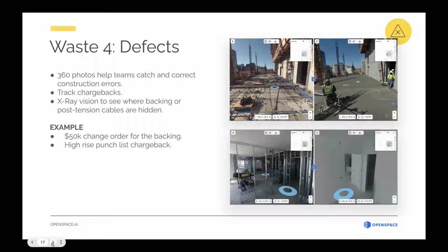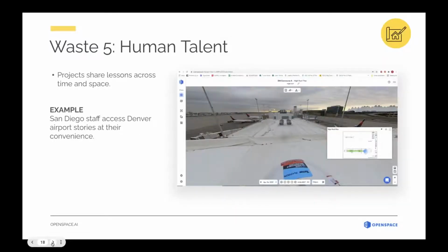stations, charging stations. They were actually able to go back and virtually punch list, much like the SoFi Stadium Chris example was saying, but using this functionality called field notes, go back and punch list all the items where the glazing contractor was deficient, and be able to get that report out to them, so that they can quickly ameliorate the problems and move the schedule along. And that project said that because of that one issue, they saved 2 weeks in the schedule. So just another example of how getting that information quickly, not having to wait on it, being able to identify those issues so that you can address schedule and keep the project running smoothly, I think are great examples.